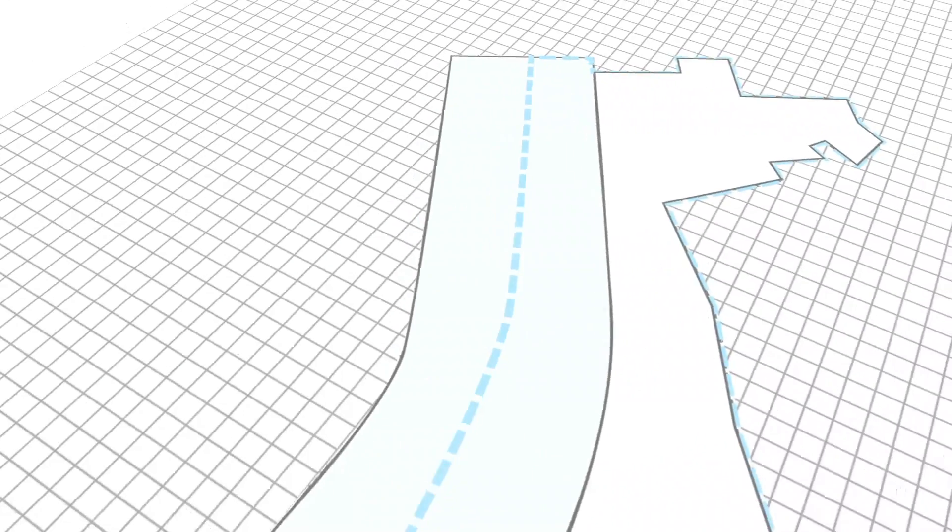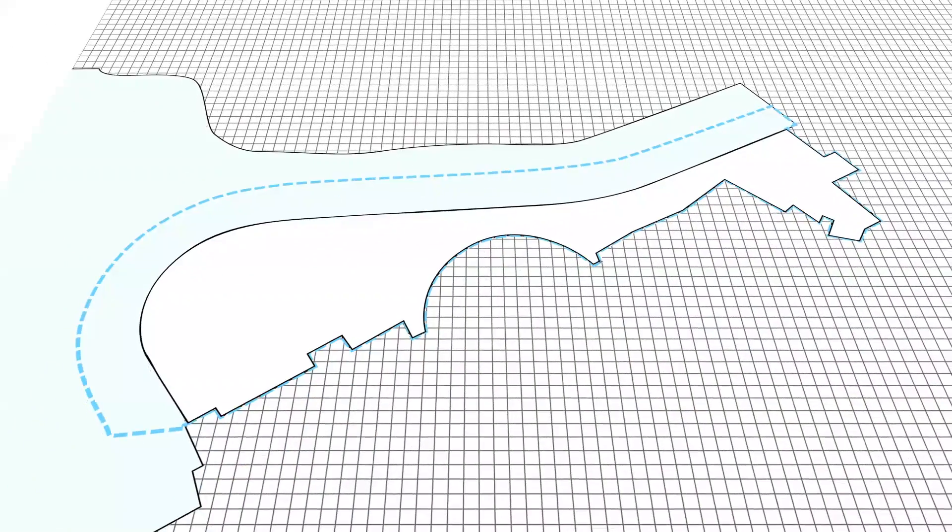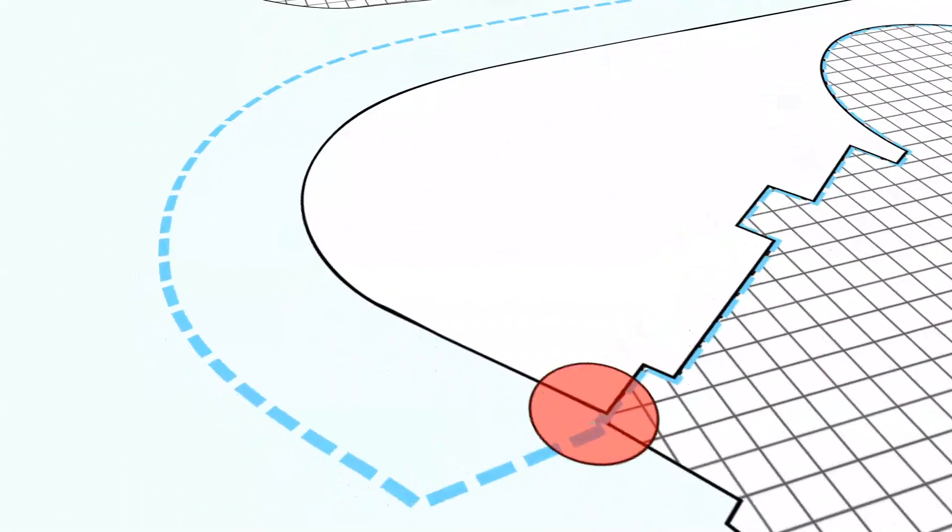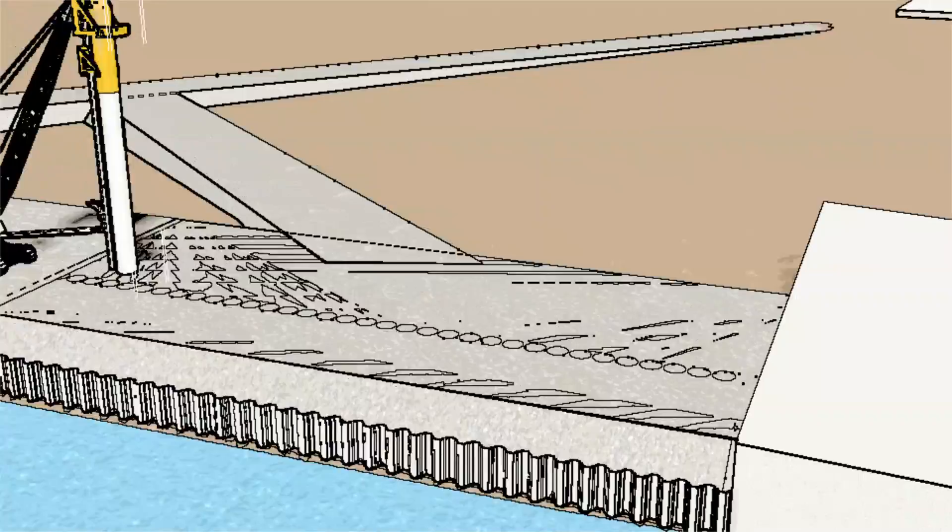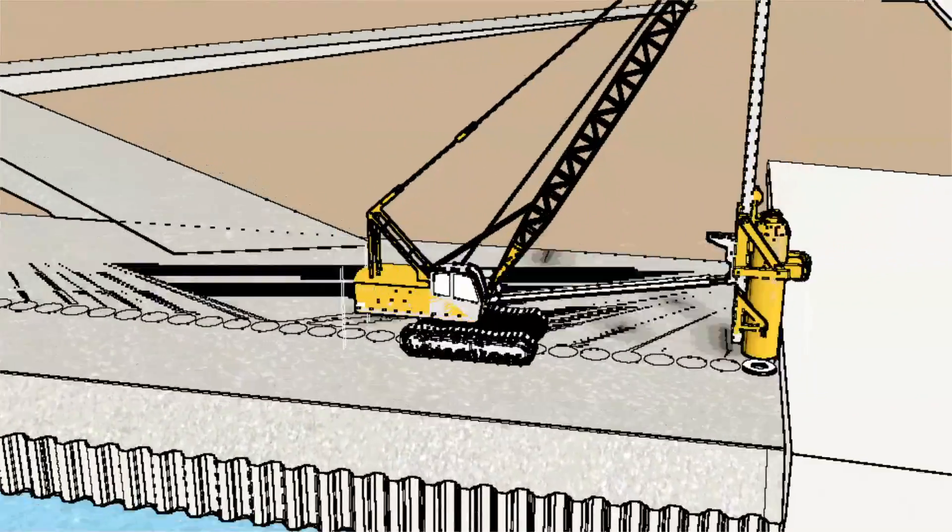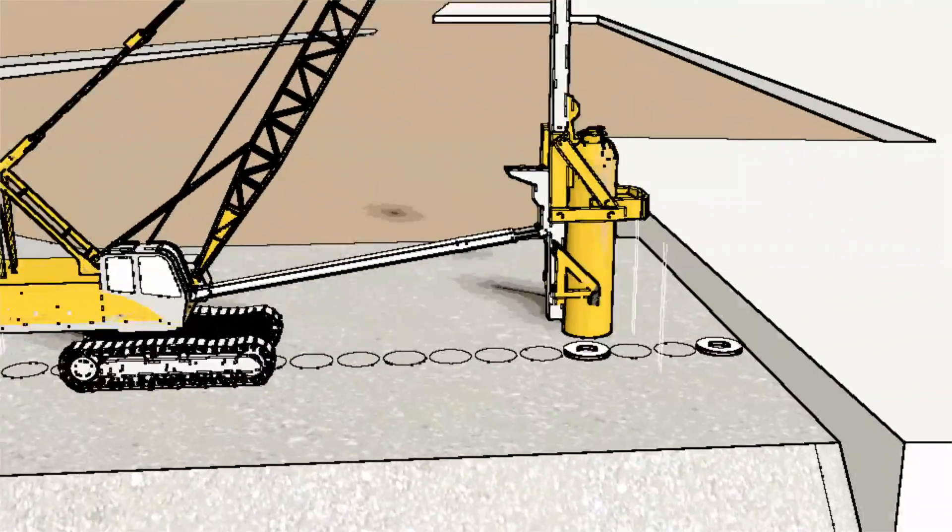Once the temporary bunds are ready to receive the permanent works, i.e. piling, these will also begin simultaneously from both South and North ends, and works will be similar in sequence.